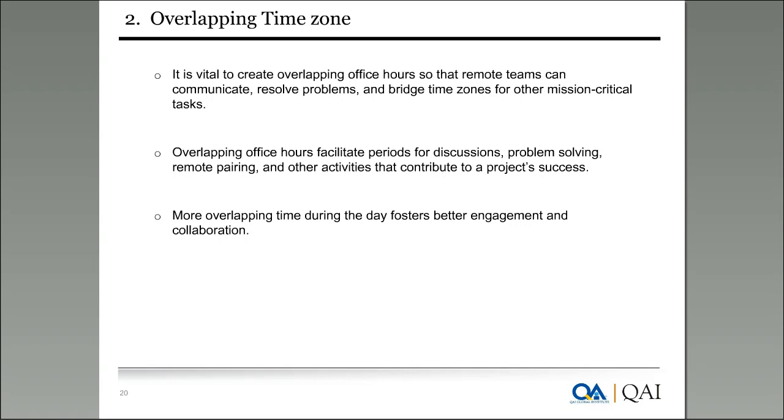If the overlapping time zones are not there, and an issue comes up, a query from a developer goes to the product owner, who will see it the next day and provide a clarification. Then the product owner sends that clarification on the second day, and the developer reads it, and if he doesn't understand, even for some simple clarification, simple issues that need to be sorted out among the team members, it will take 2-3 days.